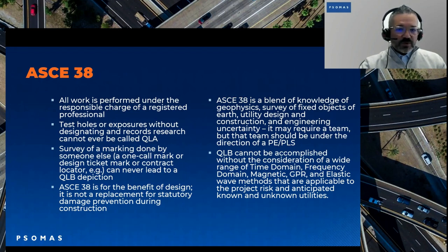Test holes or exposures without designating and records research cannot ever be called QLA. Just because you're punching holes in the ground doesn't mean that you get to call it QLA. If you haven't followed the proper procedures by going from D to C to B to A, you shouldn't be calling it A. Remember, this is risk management. And by not following all the proper procedures, can you really get to that highest level of risk management?